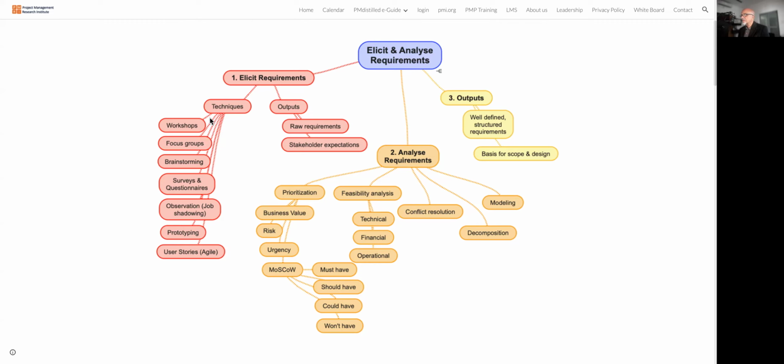So we call it user story workshops. The advantage of this is the domain knowledge gets transferred to the development team. So before the product owner goes back to their respective place, the tacit knowledge about the functionality gets transferred to the development team.